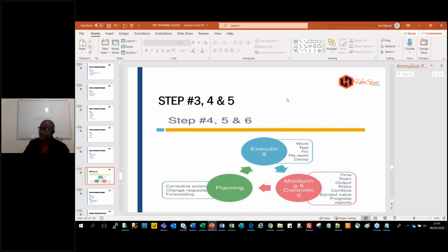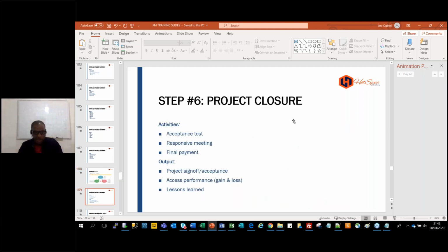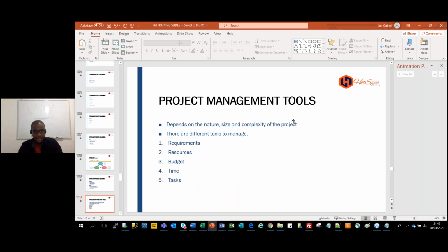That's where you see organizations recruiting contractors. Now, there's a project that's already failing. We need people on board. Come on, guys. They need more resources to meet the deadline. That's the reason. If they have the time, they don't need resources. If they don't have the time, then they need money. Don't forget those 3 constraints. You don't have time. You don't want to miss the date. You need money. Money means more resources. Yeah, that's how it works. Stages 3, 4, 5. That's how it works. Right. Then project closure follows after, and that's it.